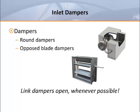So what can go wrong with a damper? A lot of problems can be avoided by manufacturers shipping units out with the dampers full open. This allows air motion through the system before the controls are in operation. It also prevents possible unauthorized personnel from climbing up to the boxes to readjust or force the dampers open. This often involves loosening the set screws on the damper actuator, turning the damper shaft with pliers, and then locking the screws back down. Everything's fine until the control contractor finds that some or all the dampers have been tampered with, necessitating a visit to each unit by his startup technicians to verify the damper orientation and properly torque down the set screws. When hundreds or even thousands of units are involved, this can be a major problem.